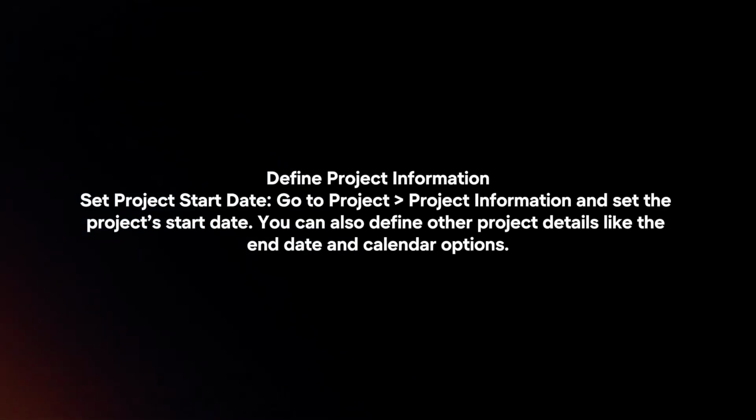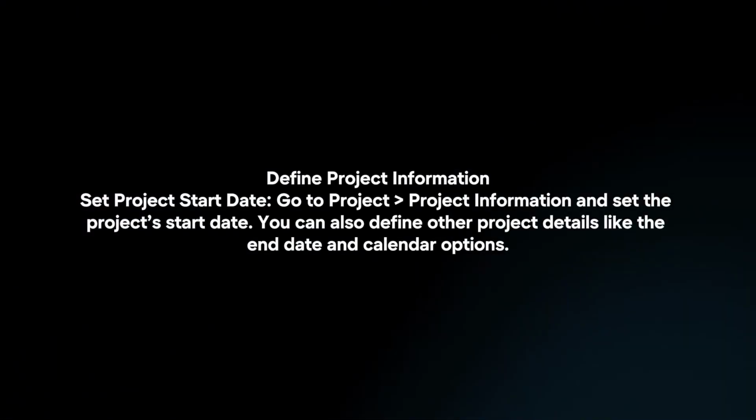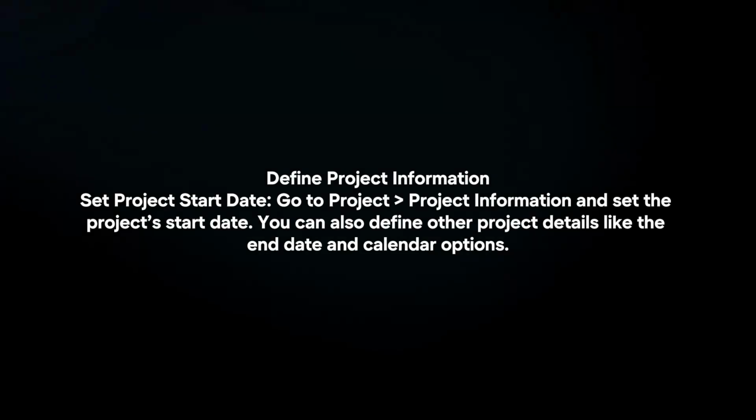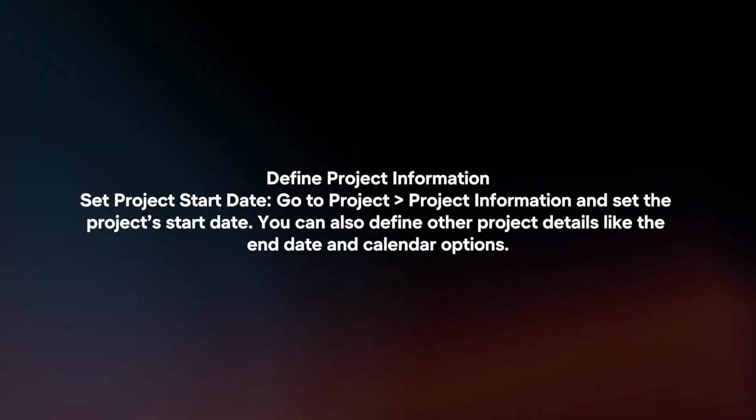Define project information. Set the project start date. Go to Project, Project Information, and set the project start date. You can also define other project details like the end date and calendar options.